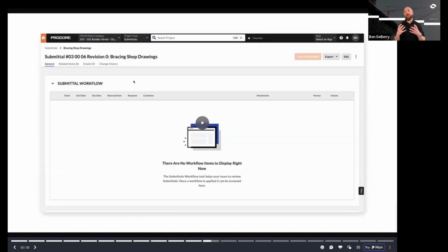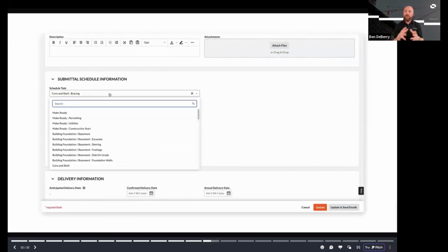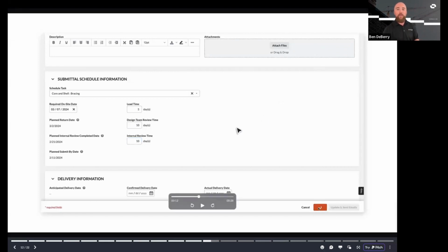From here, I want to talk about our submittal integration process. And I've got a quick little video here. I'll go ahead and turn it on, but I'm going to speak as we do it. When you're within Procore, you're going to have the ability to create a new submittal. And because you have that connected schedule, when you're creating that submittal, you will have this schedule information tab. When you use this dropdown, you're going to see a list of all of those items that are in your schedule, and you're going to be able to connect that submittal directly to your schedule. And I'll show you what that looks like in a moment.